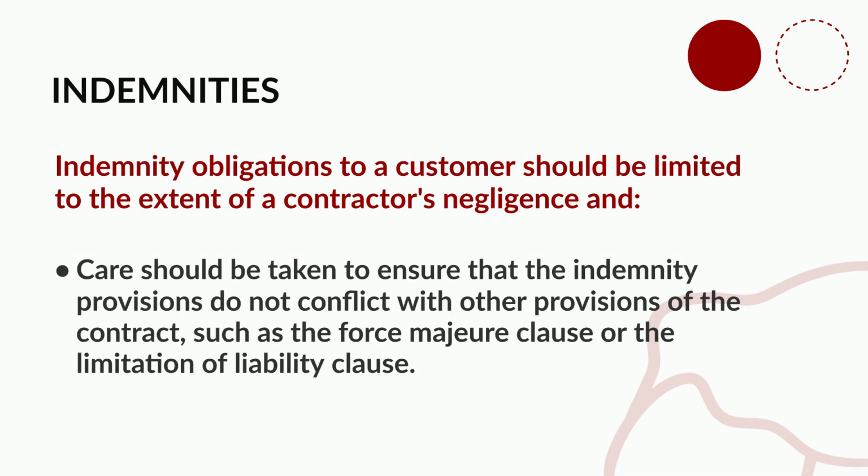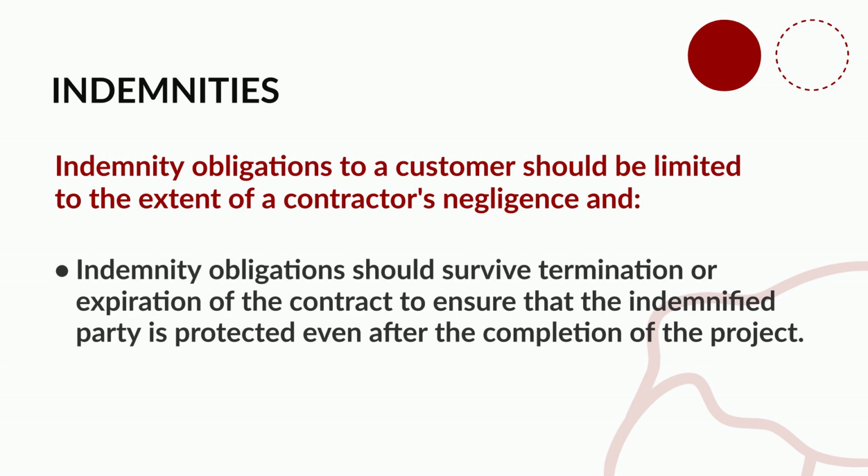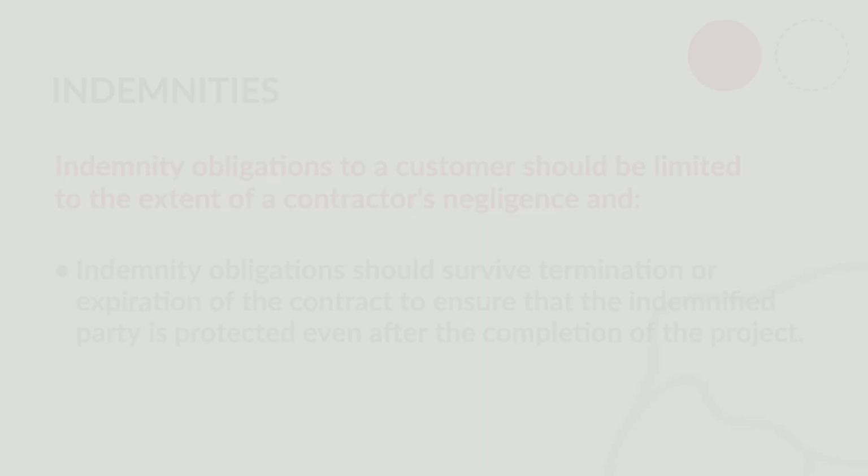Care should be taken to ensure that the indemnity provisions do not conflict with other provisions of the contract, such as the force majeure clause or the limitation of liability clause. Indemnity obligations should survive termination or expiration of the contract to ensure that the indemnified party is protected even after the completion of the project.